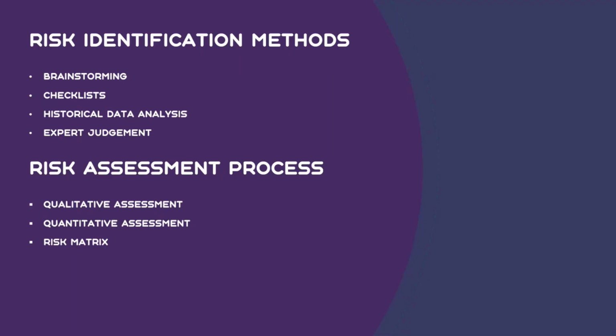So what I explained is basically purely the identification mechanism. If you're a post-contract quantity surveyor and you start your project, in the first month you prepare a cost report, and when you compare the total cost against the budget for that month and see that it is overrun, there's a risk for you. Immediately you have to identify those risks and address them. Basically, just an example of how we identify the risk.